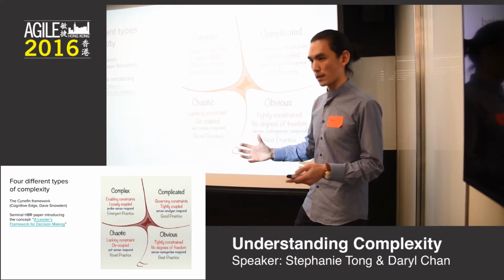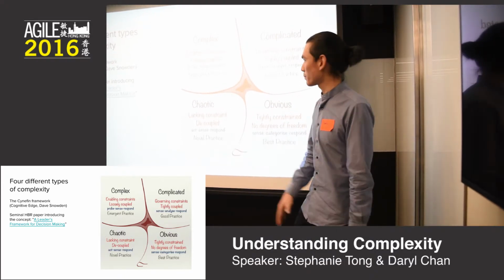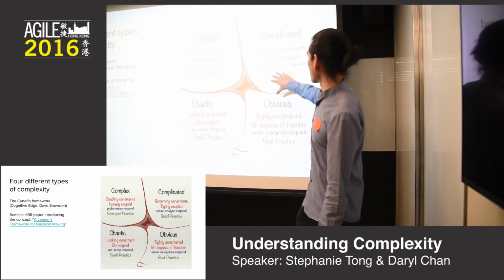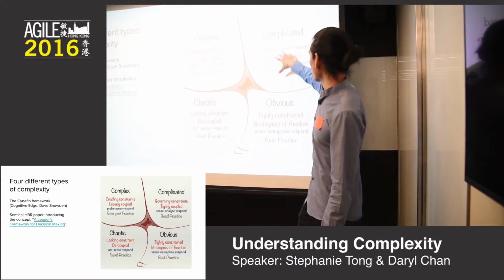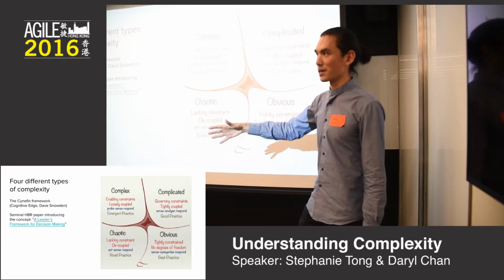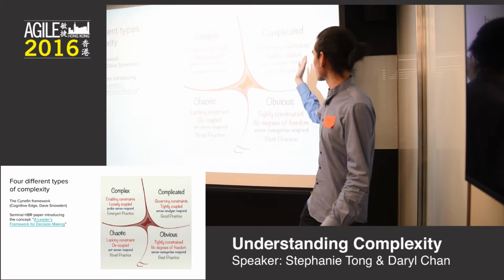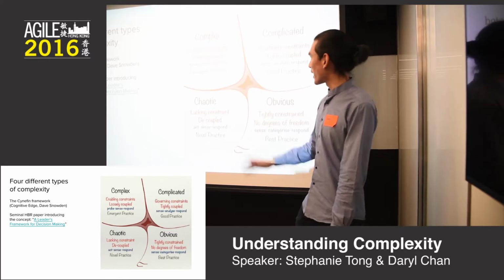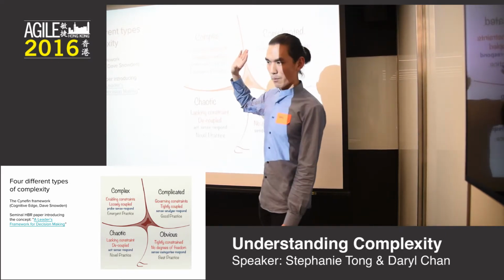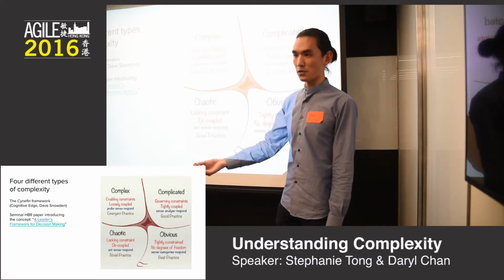And then together you can brainstorm, have a bit of a workshop. If everybody can get the plan together, and the experts can agree on how it can be done, such as the birthday month and year thing, then maybe it's a complicated thing and you go with that. Otherwise, you can use Scrum as a bit of an experimentation method, okay?